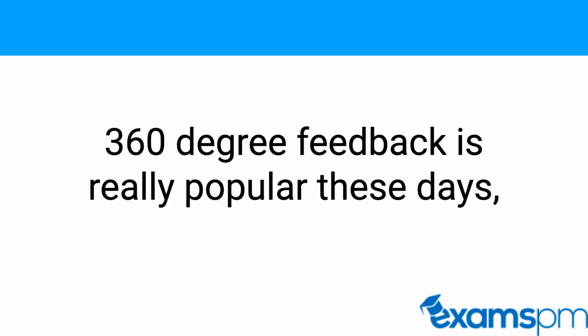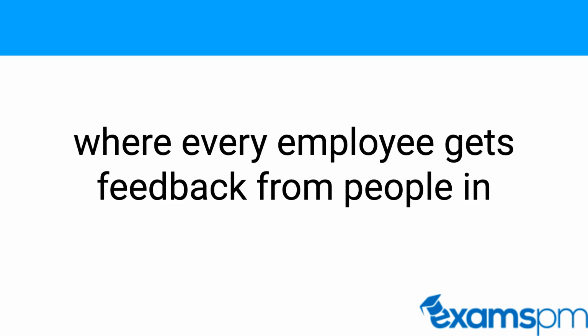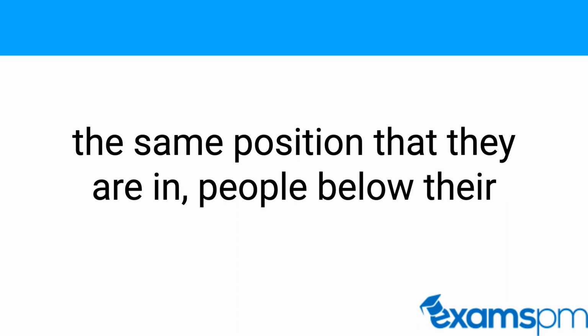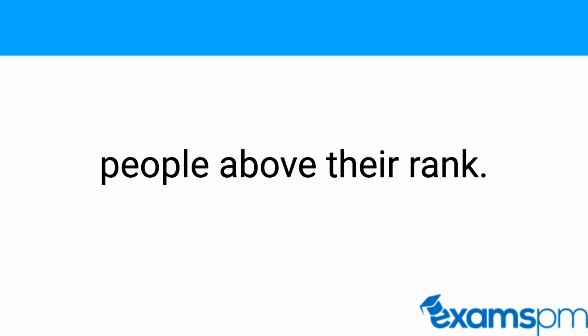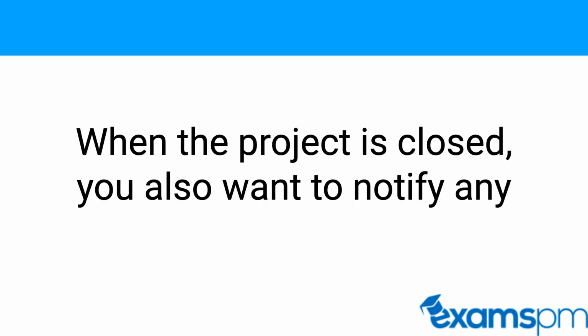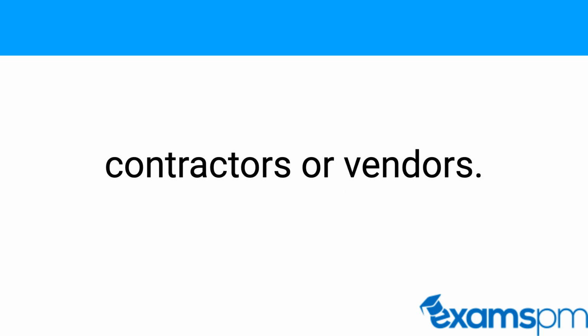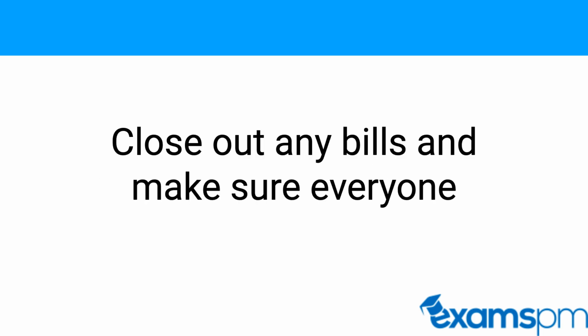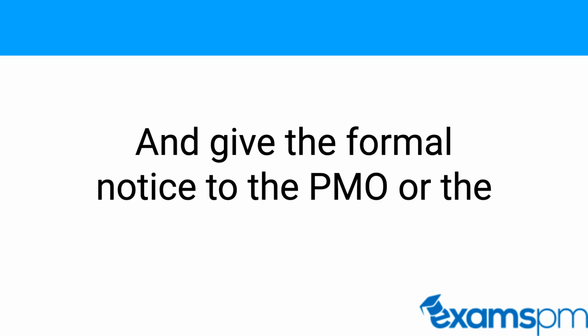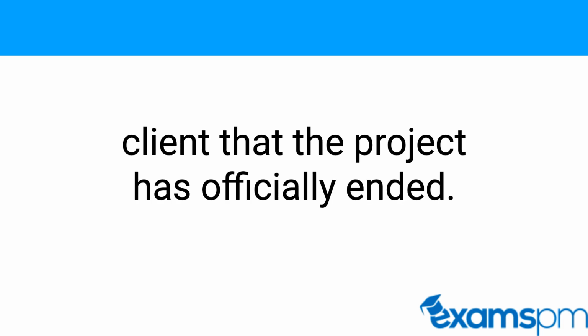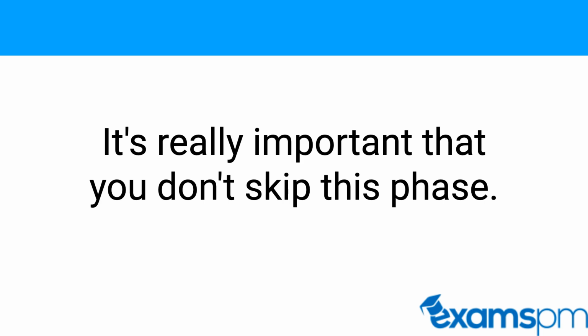360-degree feedback is really popular these days, where every employee gets feedback from people in the same position that they are, people below their rank in the organization, as well as from managers and people above their rank. When the project is closed, you also want to notify any contractors or vendors, close out any bills, make sure everyone has been paid, and give the formal notice to the PMO or the client that the project has officially ended. It's really important that you don't skip this phase.